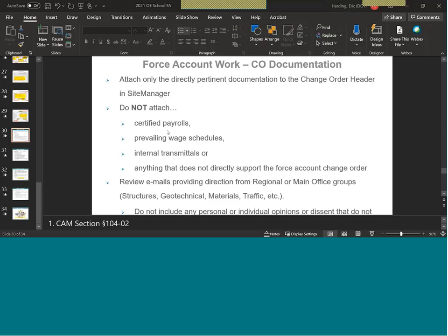Eric? Yes. The spec does read it. It's still the aggregate of 10 days and not 100% of an item. Thanks, boss. Sure. So that's another thing that you want to look at when you're reviewing service, is that if they're doing 100% of an item, they can't be considered a service.